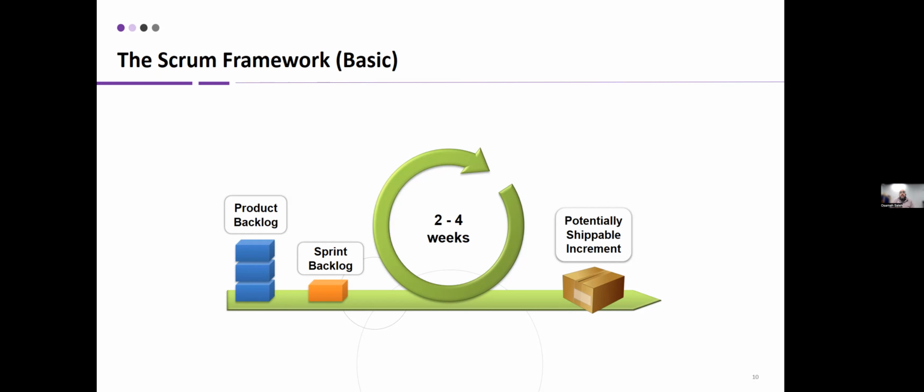Okay, so let's say it's a 1 year project in Salesforce. We spend about 3 months analyzing the requirements, what the client is asking for. We spend 6 months building the solution, and then maybe 2 months at the end doing quality assurance. By the end of the year, we give things to the client.